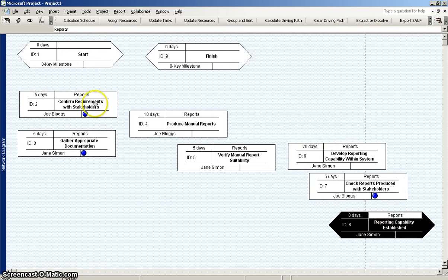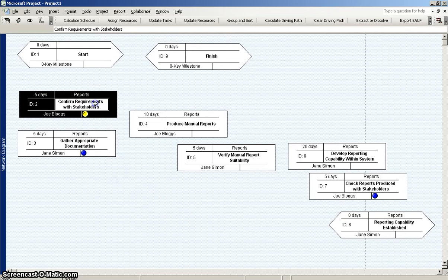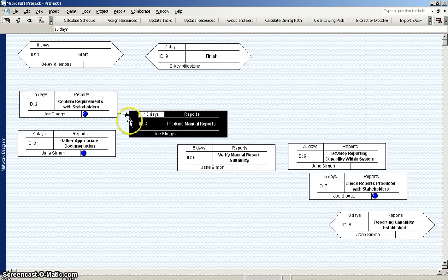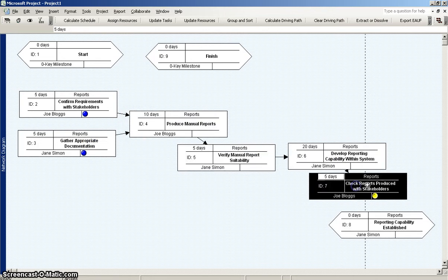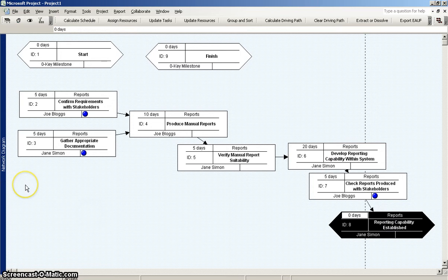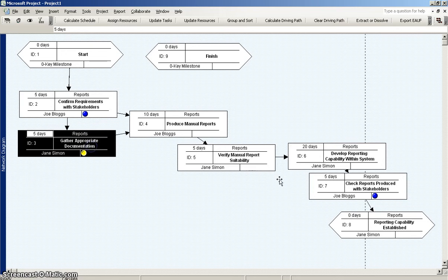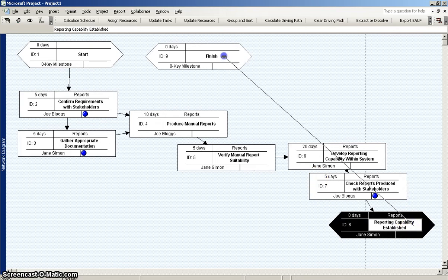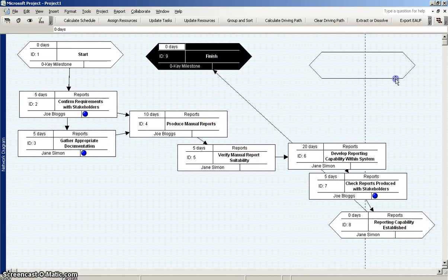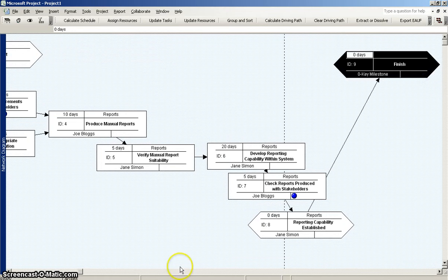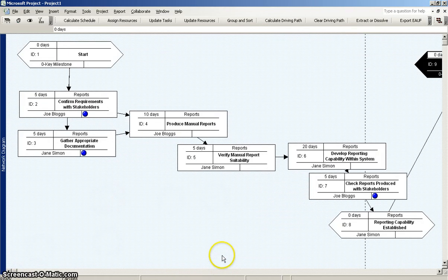If everybody goes along with that, then you can connect the activities as so. So you left click in one of the boxes, drag that into its successor. You can see that little link chain that it's drawing there, and when I let go, it'll draw the arrow of the connection. You can do that for each one of these, and voila, you've got a network diagram created. And I can even draw the links in here with start and finish. So let's say this goes into the finish for the task.